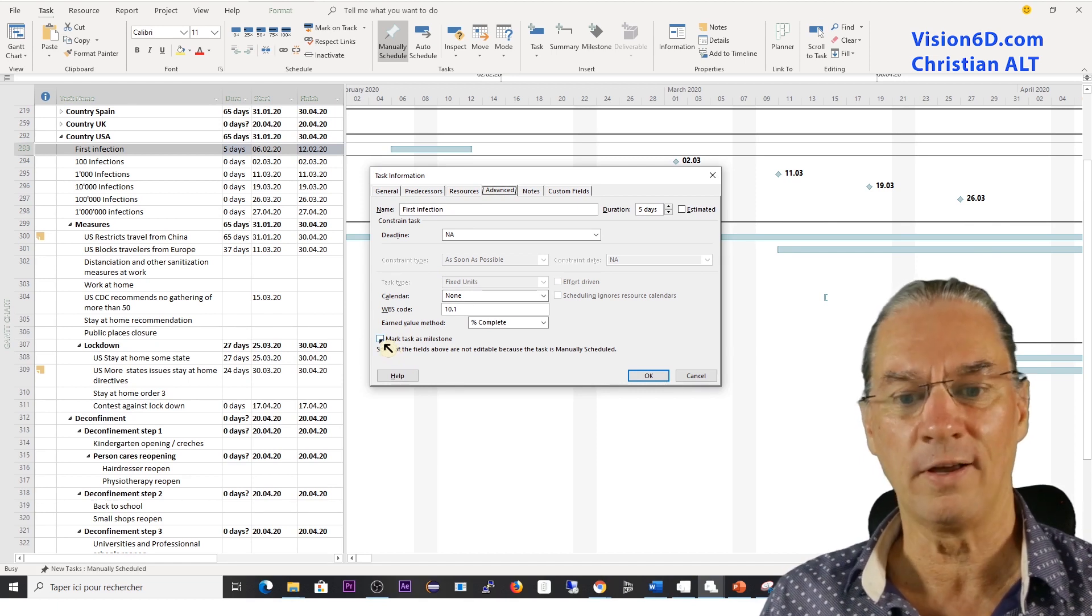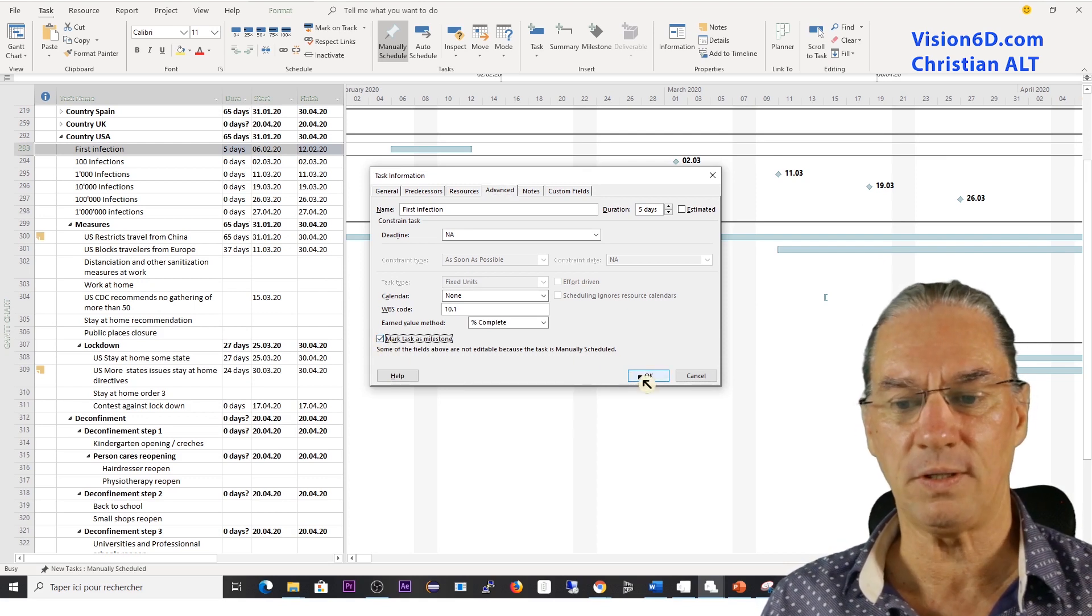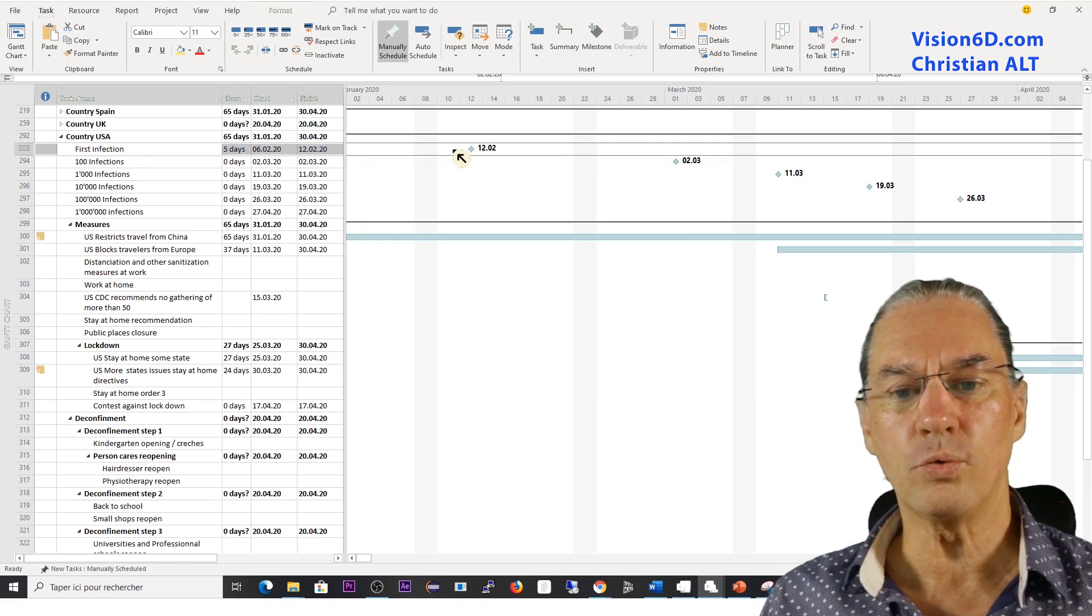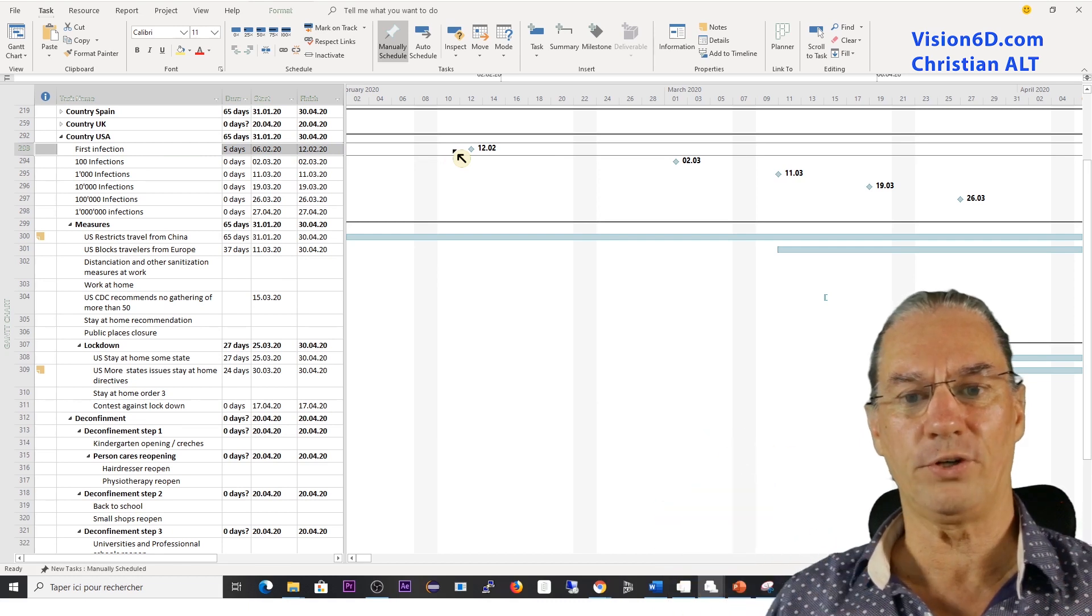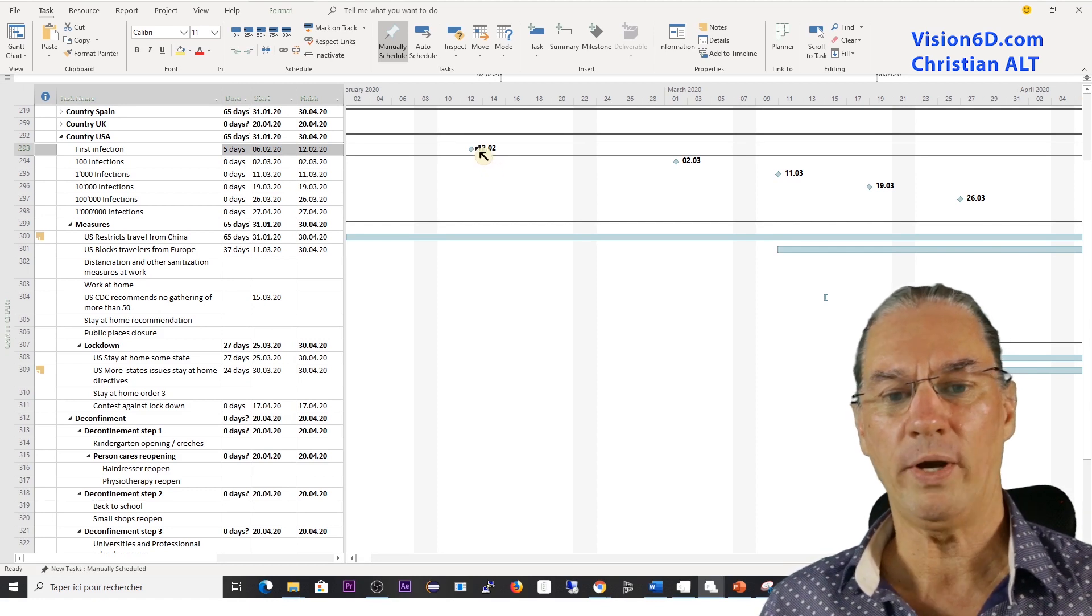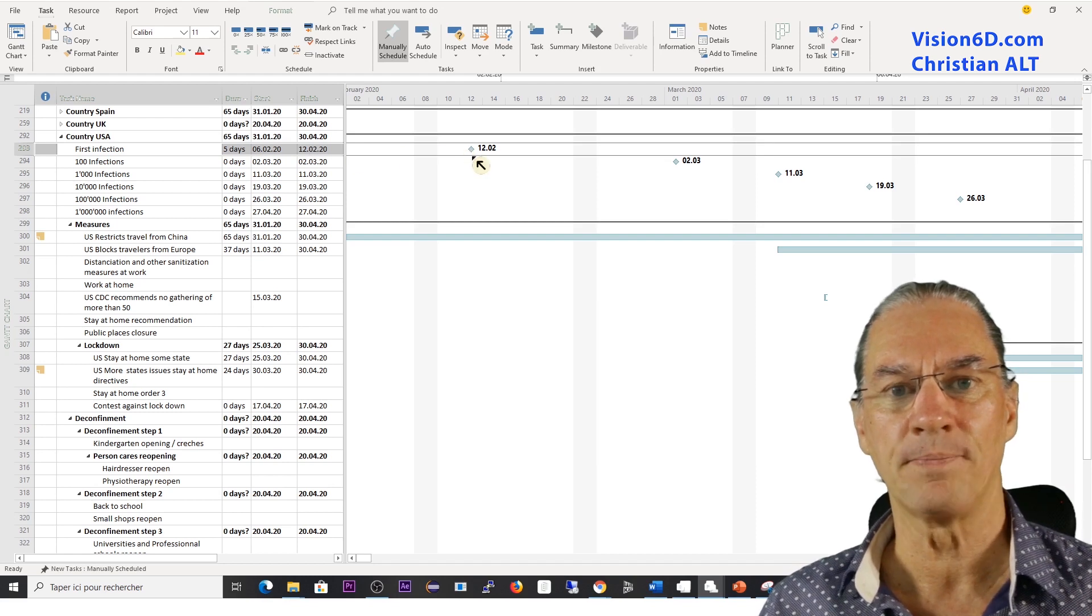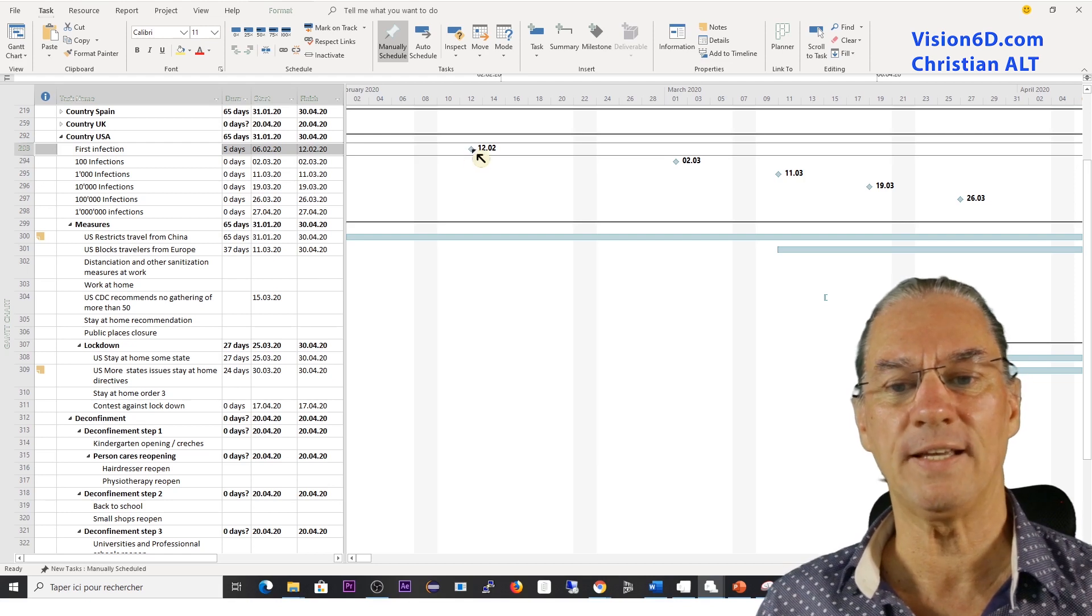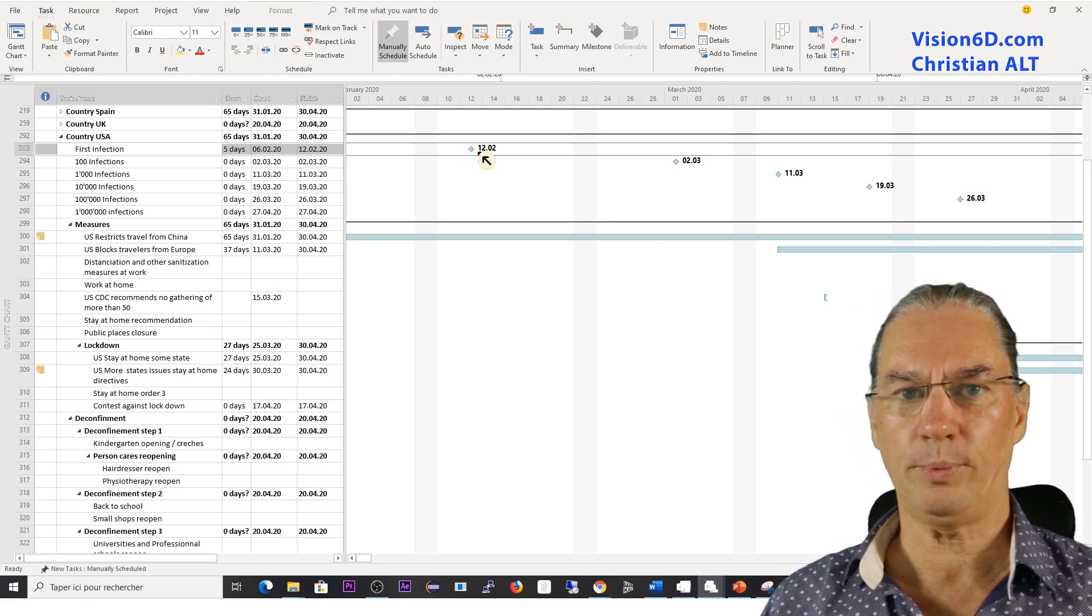So I'll do it for a task with a certain duration, and you will see now how it comes up. You see? So we removed the entire duration of the task, and it was replaced by a diamond. This is what happens when the task with a certain duration here of 5 days is marked as being a milestone. And you will notice that it's the end date that comes.